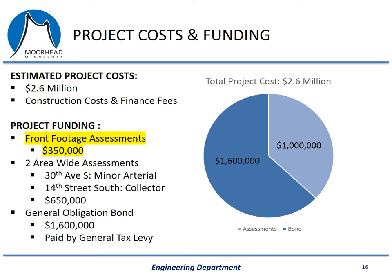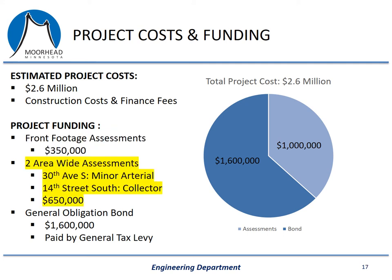By city policy, special assessments will be levied against the benefiting properties. There are two types of special assessments. The first is front footage assessments — properties immediately adjacent to either 30th Avenue South or 14th Street South will receive a special assessment based on the type of work being performed on their street and based on the front footage of their property. For rectangular lots, front footage is determined as the width of the property abutting the street being improved. The second type is an area-wide assessment. By city policy, every property in the city is assigned a north-south collector street and an east-west collector street. 30th Avenue South and 14th Street South are both considered collector streets. Because these collector streets see higher volumes of traffic, they are designed to a higher standard and are more costly to construct, maintain, and replace. When improvements are made to these streets, the city levies an additional area-wide assessment to the properties to which the street has been assigned.